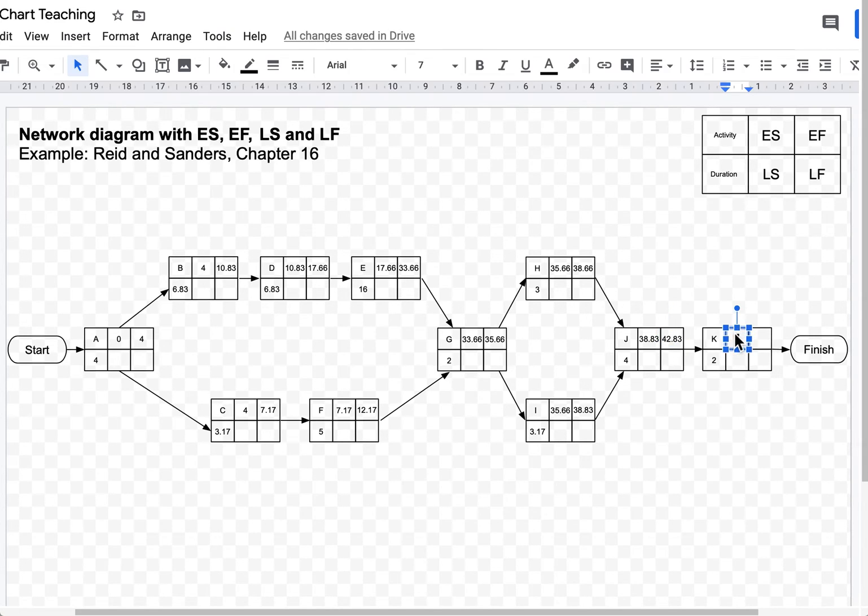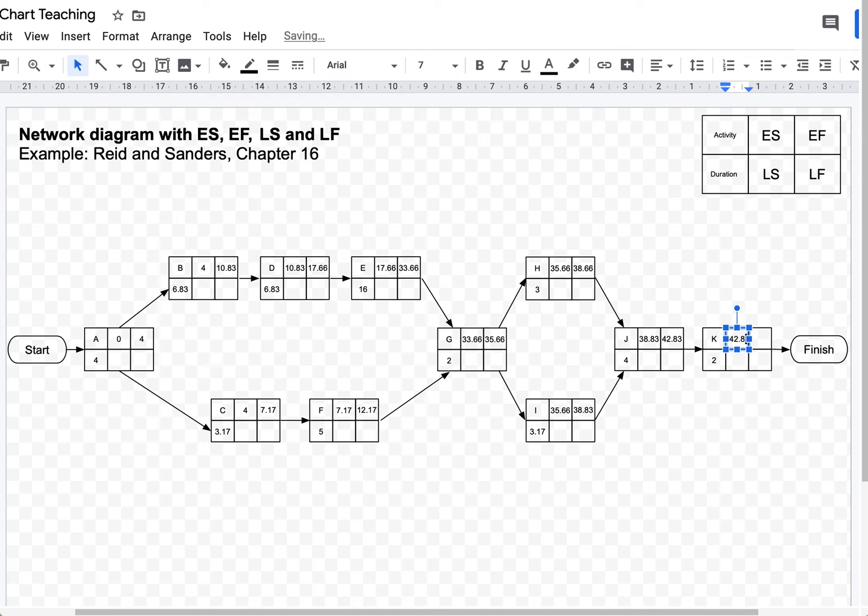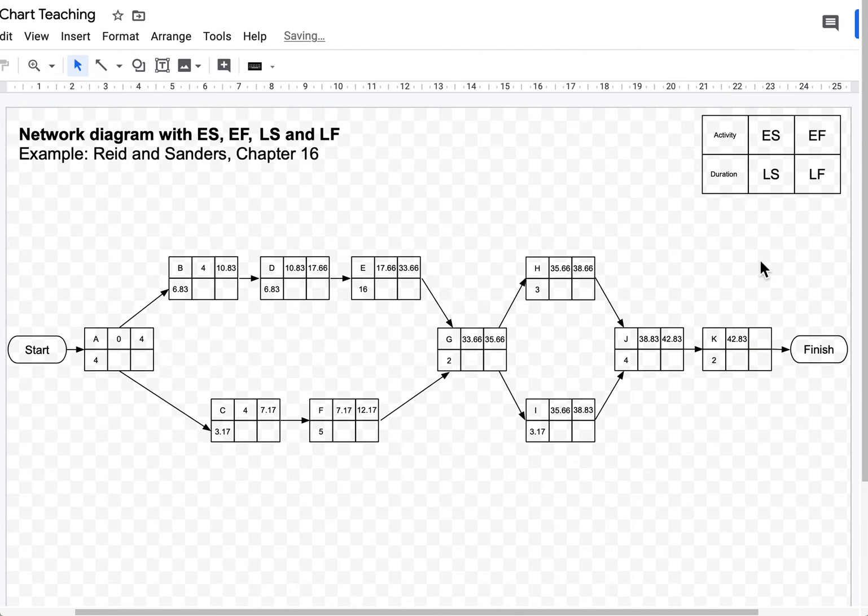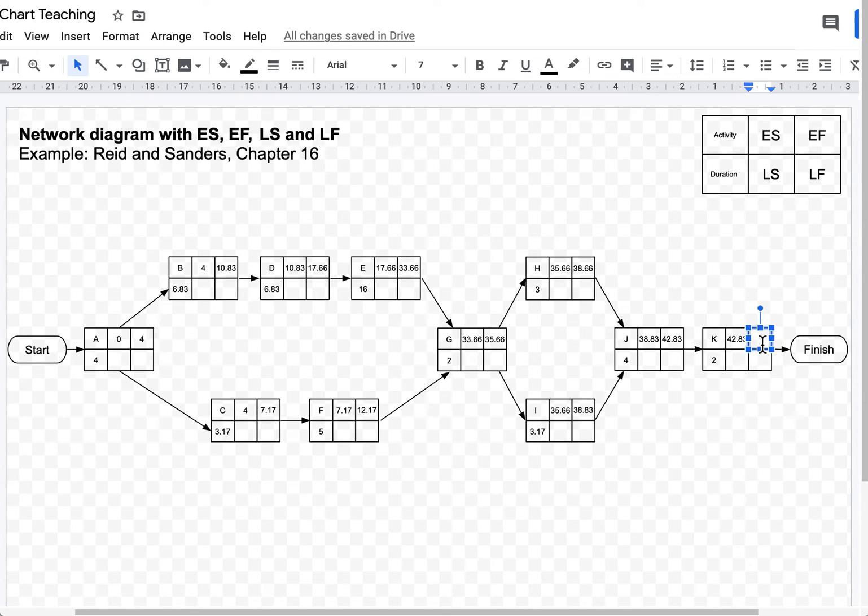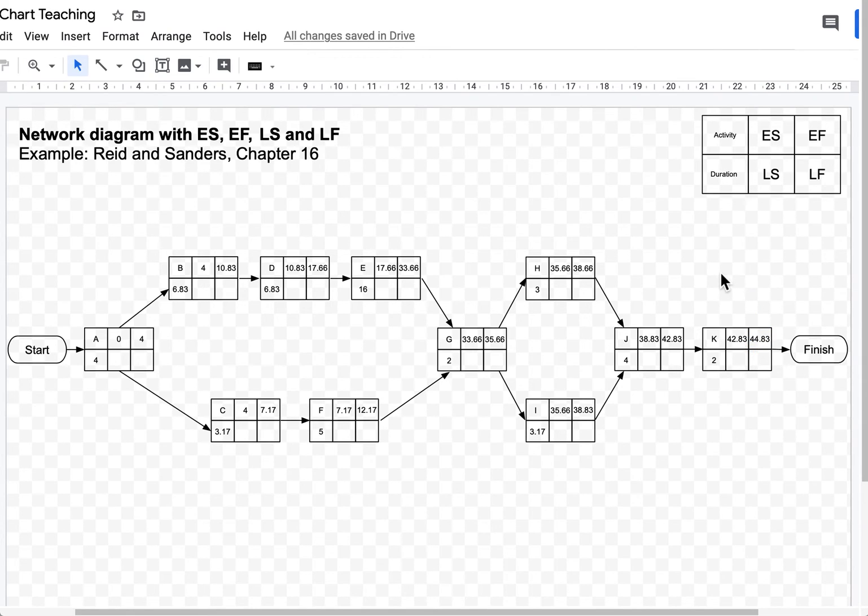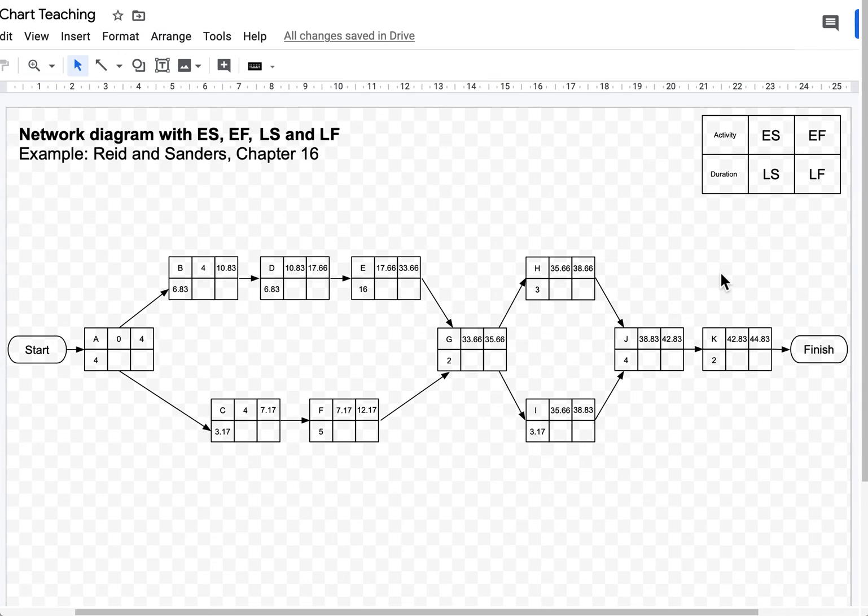Activity K can start on 42.83. 42.83 plus 2, that's 44.83. And if we're working correctly, that 44.83 should be exactly the same as the time taken to finish the longest path.